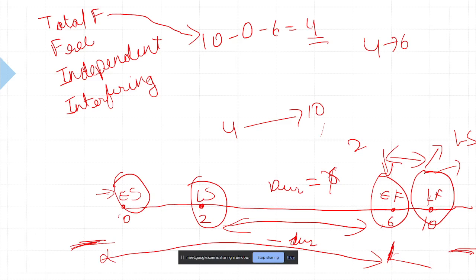You get early finish just by going forward, when everything has happened in a perfect manner. There was no delay. You didn't take care of any delay. You just assumed that every activity will finish in the same duration as you have written. That's how you got your early finish.